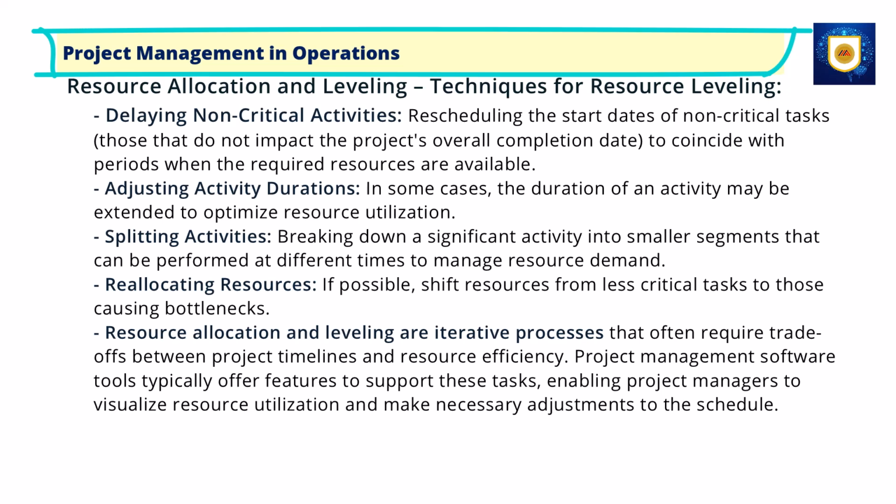Adjusting activity durations, in some cases, the duration of an activity may be extended to optimize resource utilization. Splitting activities, breaking down a significant activity into smaller segments that can be performed at different times to manage resource demand. Reallocating resources. If possible, shift resources from less critical tasks to those causing bottlenecks.